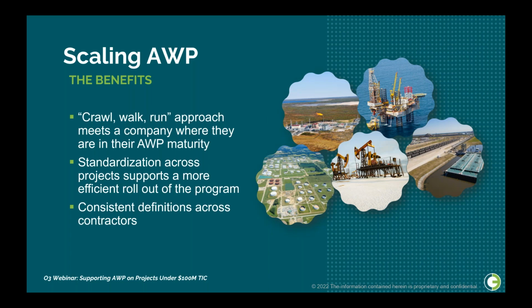This also has the added benefit of allowing you to learn lessons quickly and apply them to subsequent projects, which helps to refine your AWP process. What we have seen work well is initial introduction of just installation work packages, followed by the expansion to properly managed and released construction work packages, and then expansion both upstream and downstream into engineering and testing.